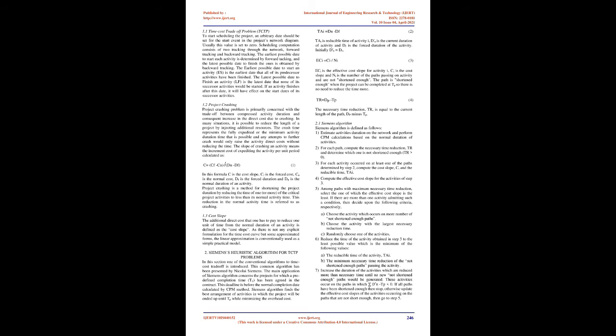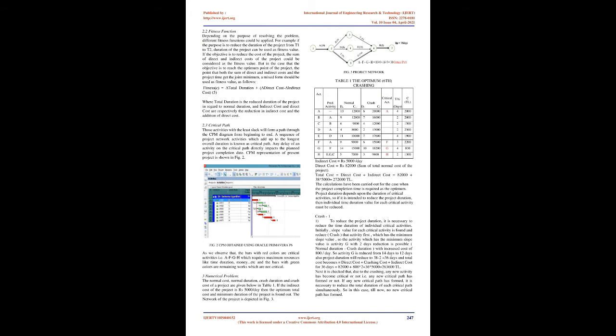The slope of crashing an activity means the increment cost of expediting the activity per unit period, calculated as: C is the cost slope, CF is the forced cost, CN is the normal cost, DF is the forced duration, and DN is the normal duration of an activity. Project crashing is a method for shortening the project duration by reducing the time of one or more critical activities to less than its normal activity time — this reduction is referred to as crashing. The cost slope is the additional direct cost that one must pay to reduce one unit of time from the normal duration of an activity. As there is no explicit formulation for the time-cost curve, the linear approximation is conventionally used as a simple practical model.